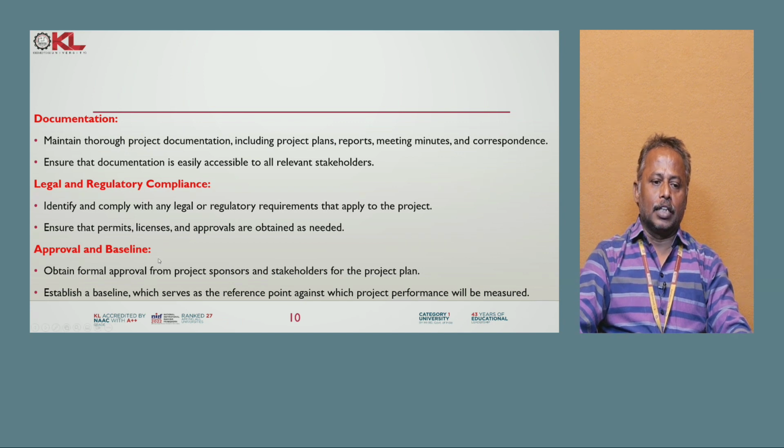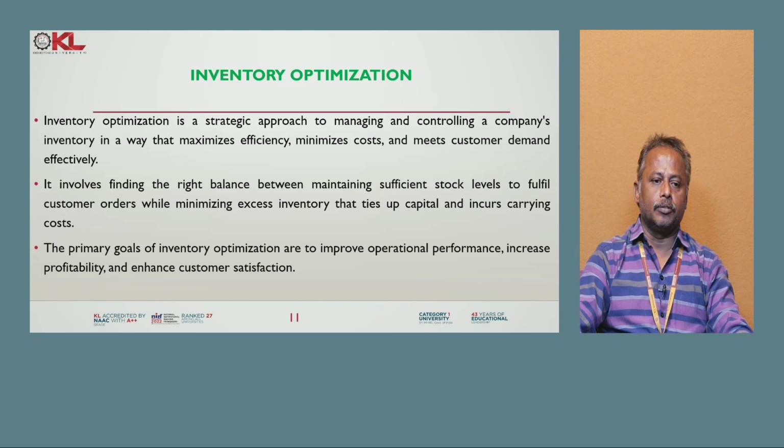Then approval and baseline. So, obtain approval from the project sponsor and stakeholders for the project plan. Then we can establish the baseline, which serves as the reference point against which the project performance will be measured.